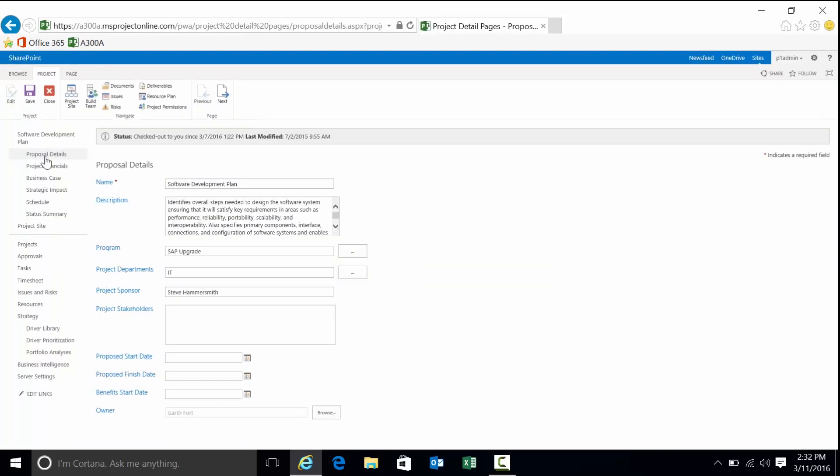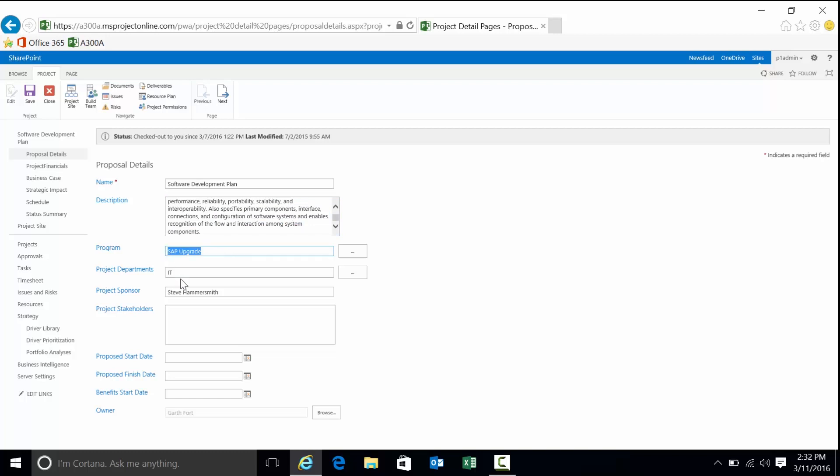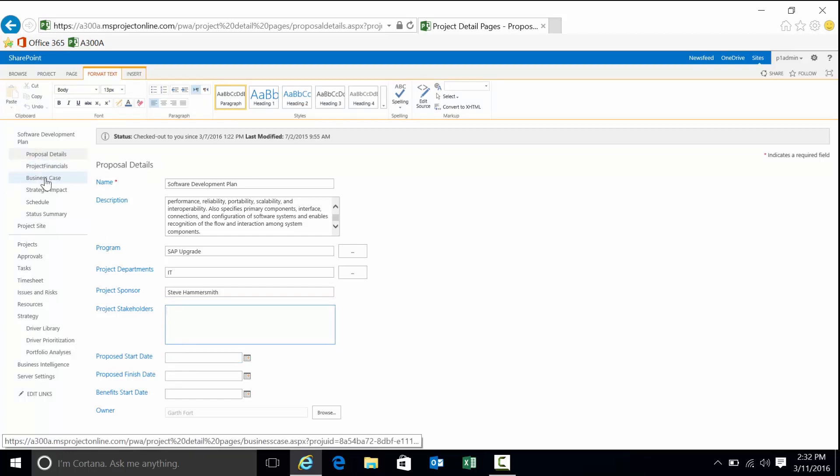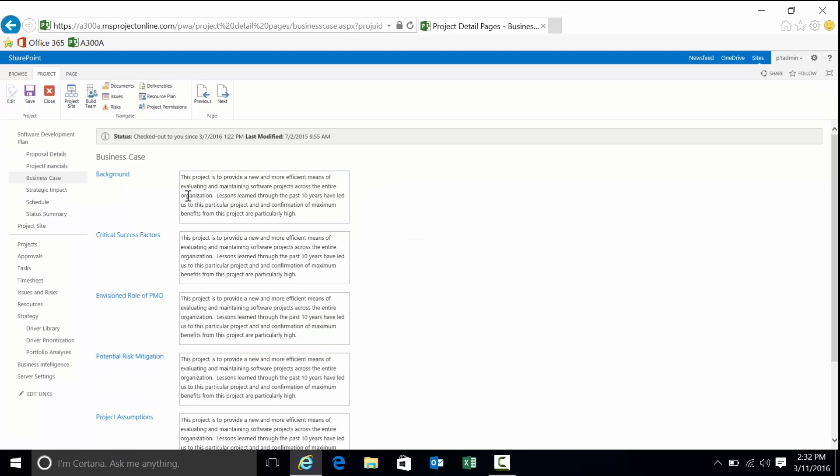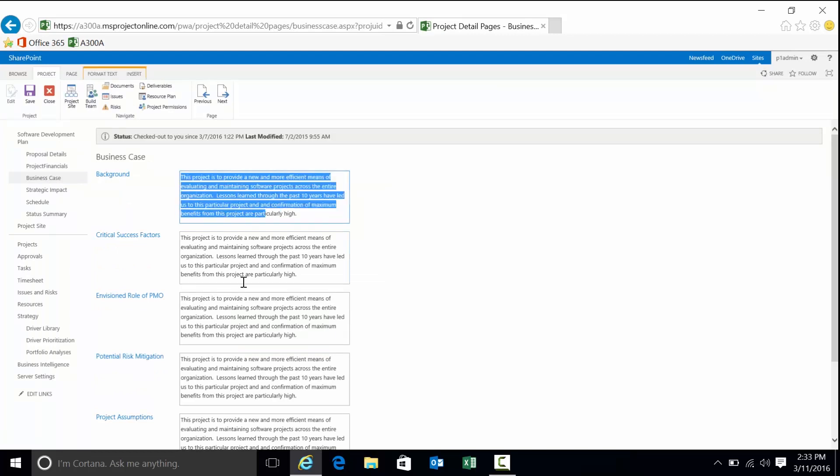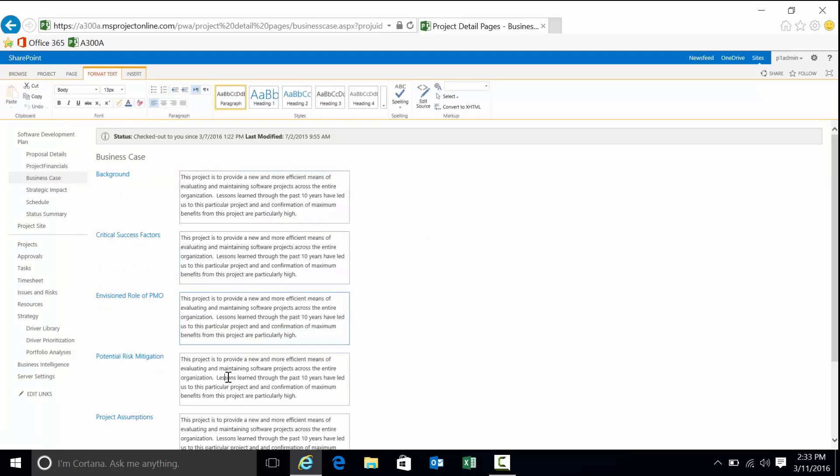For instance, think of a project charter or status report. You're going to have information such as the description. You might want to understand the program, the department, the sponsor. You might have stakeholders that you want to capture, proposed start and finish date. You might have another form such as business case. What is the background? What are the success factors? What's the role of PMO, potential risk mitigation?